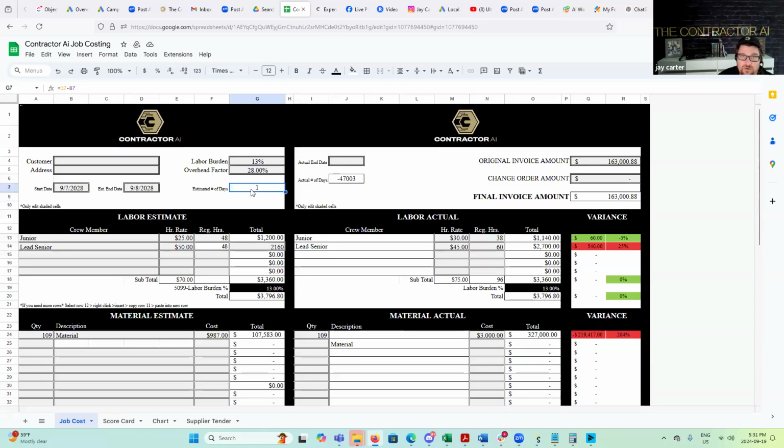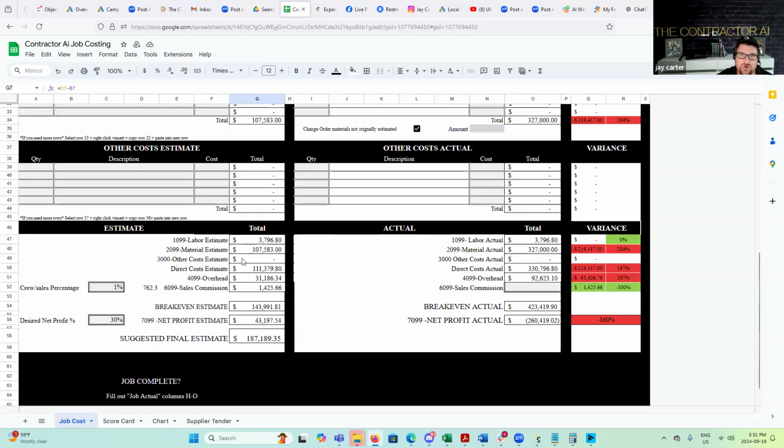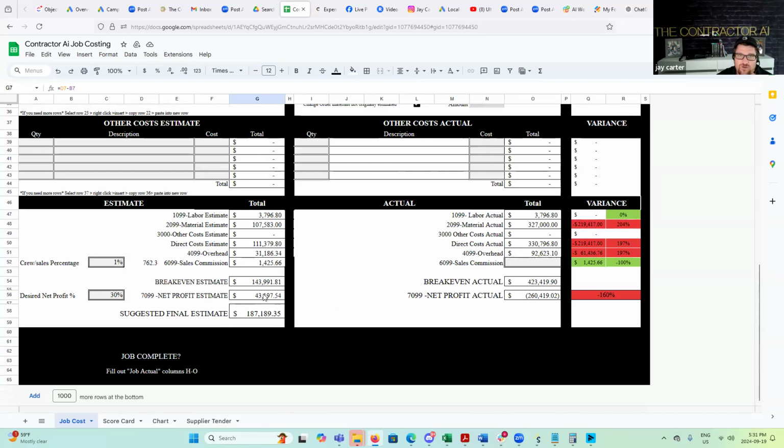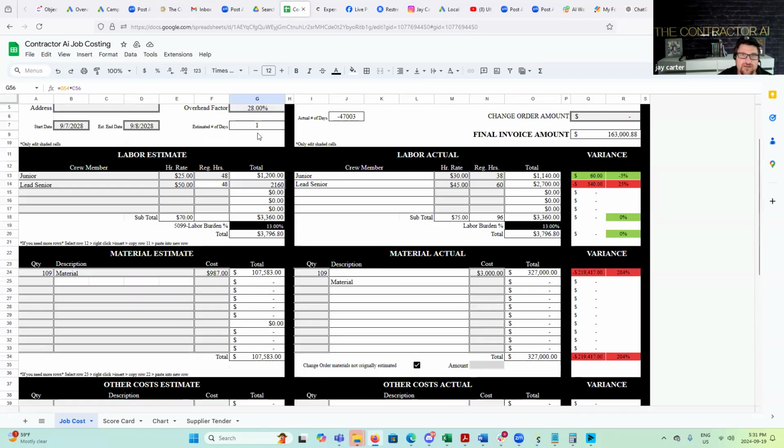So the other area that you need to be able to call is, like I said, your start dates and end dates. And the reason for that is you're looking at a job. Again, it took 14 days versus taking 6 days. We can't look at the same profit the same way. If my turnaround on my profit was scheduled for 6 days and my team brought it in at 14 days, you damn right some heads are going to roll, right?